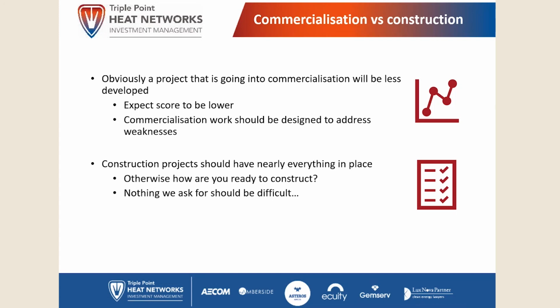If you're at construction, though, we'd expect there to be relatively few things left to complete. Costs should be very firm. You should really know what your structure is for governance. You should know where you're getting your money from, or should have agreements in place for the non-HNIP funding.